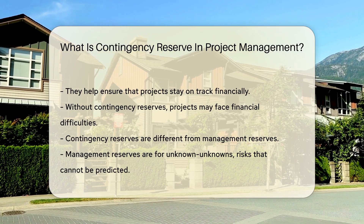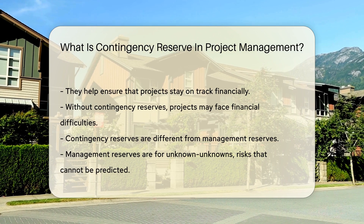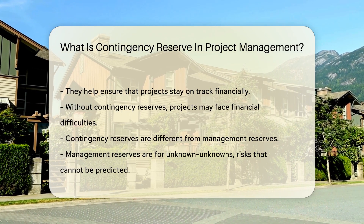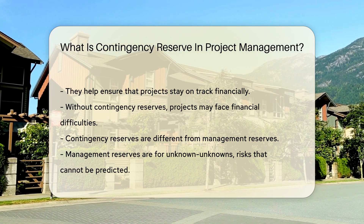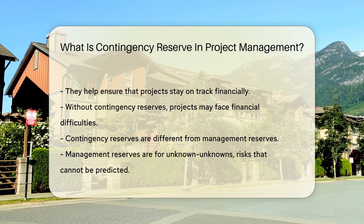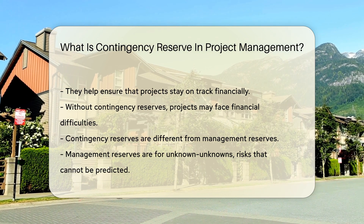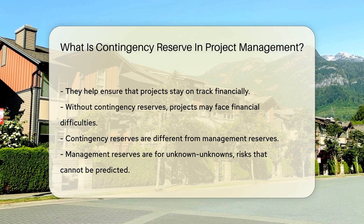Contingency reserves are different from management reserves. Management reserves are for unknown unknowns — risks that cannot be predicted. Contingency reserves, on the other hand, are for known unknowns.